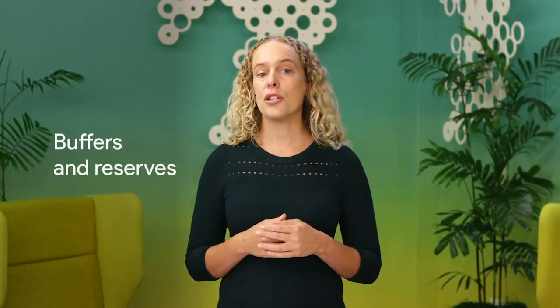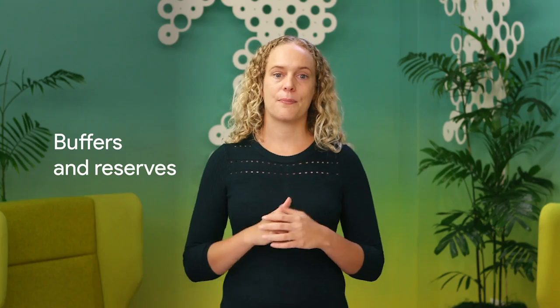And finally, we'll want to account for buffers and reserves. You'll need to factor in unexpected costs that may come up later on, so be sure to leave yourself with some buffer room. We've chosen to account for 5% of the overall project budget as our buffer. This is a standard practice, and depending upon how much detail you know about the project already, you can raise or lower your percentage for reserves. The client needs to be aware of this buffer in case spending starts to become excessive, in which case you need to problem solve with the client and agree to adjust the scope.